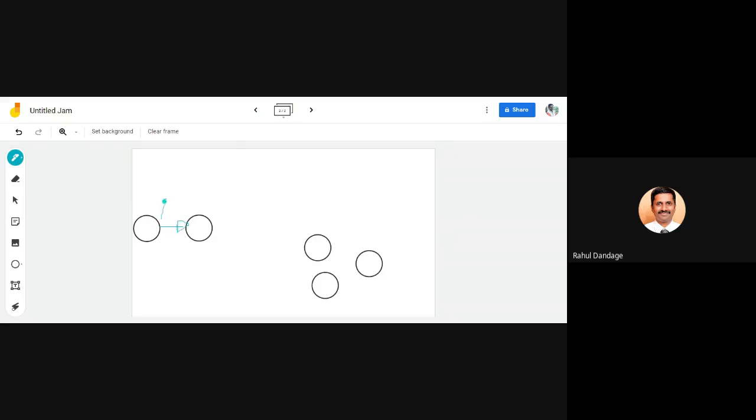This is activity A, which is independent. What do you say about activity B? It is preceded by A. Yes. So unless and until A is complete, we cannot start activity B.